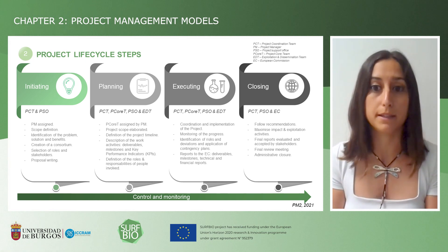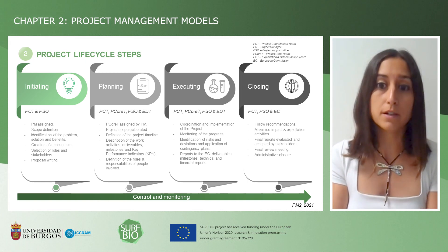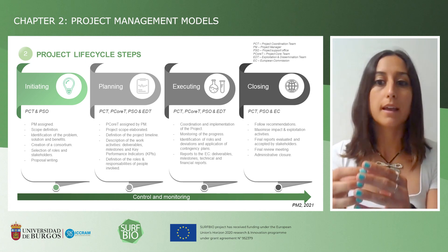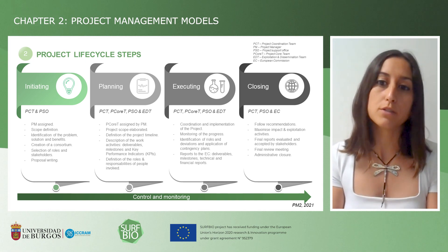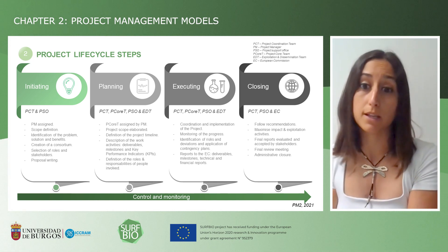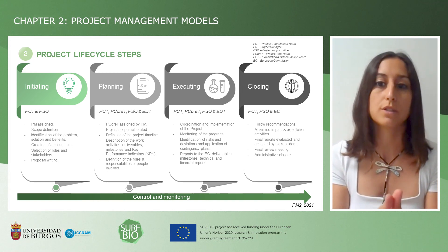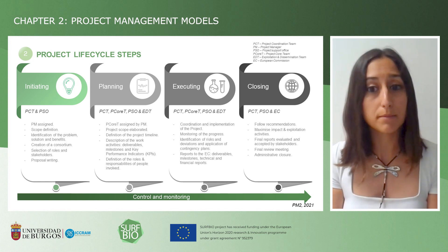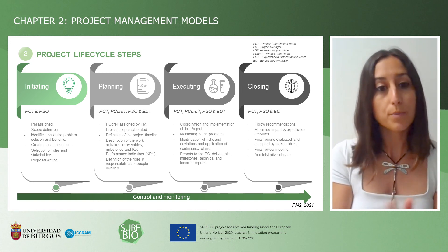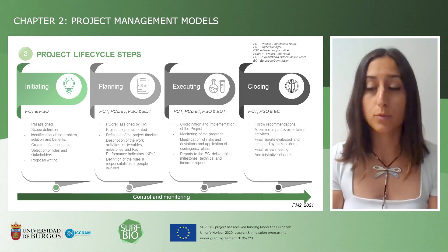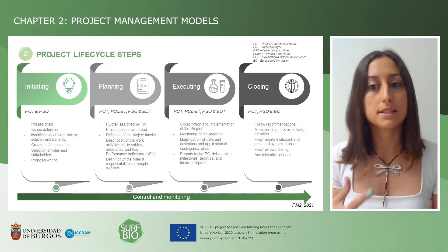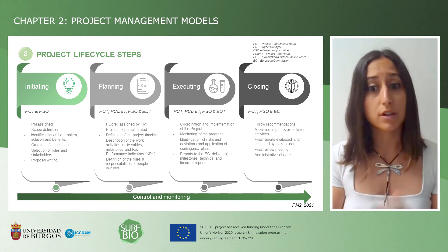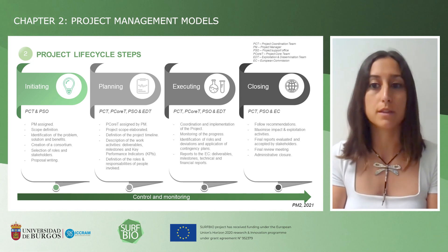Then we move on to the planning phase, where the project manager assigns a core team of technical and scientific experts. We also need the exploitation and dissemination team, the support office, and of course the coordination team. In this phase, the project scope is elaborated, the timeline is defined and assigned, and the work packages are properly described with deliverables, milestones, and key performance indicators (KPIs). The definition of the roles and responsibilities of the people involved is also important in this phase.